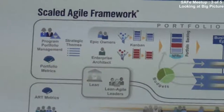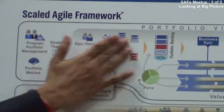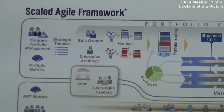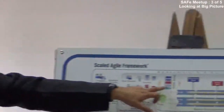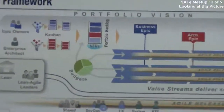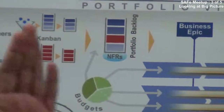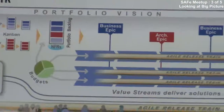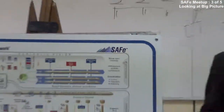They implement Kanban at this level with multiple stages — something in an ideal state, something in review state, something requiring analysis — then it goes into a portfolio backlog and then implementation. Epics which get approved pass through and start lying in a portfolio backlog, meaning the work has not yet started even though they are approved.